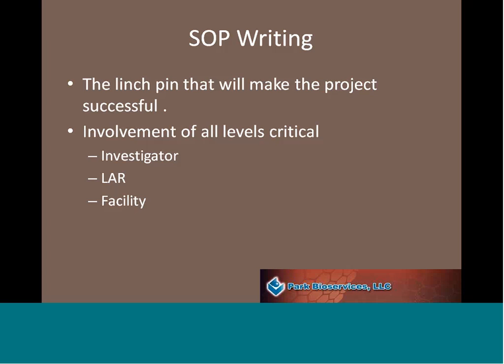So I really recommend getting everybody that's going to be involved with the germ-free study there at the initial meeting, and that even goes to facility people, because there are little things like controlling the traffic flow in an area where a germ-free study is going on, so that people don't come in and inadvertently open an isolator, or do something that would contaminate the project.